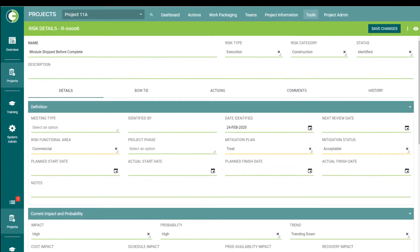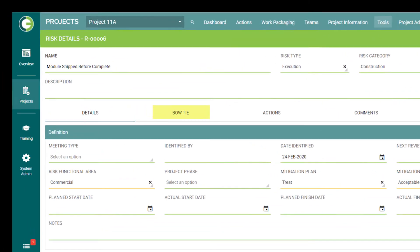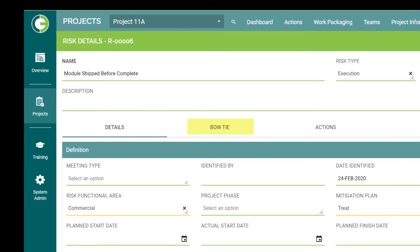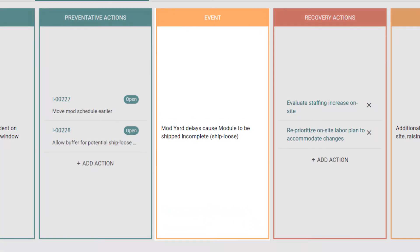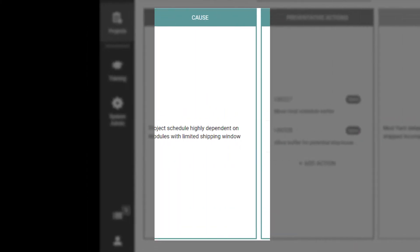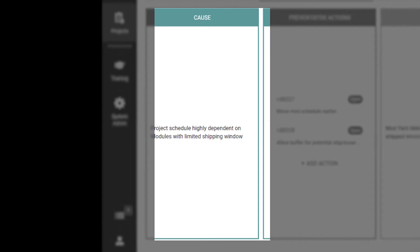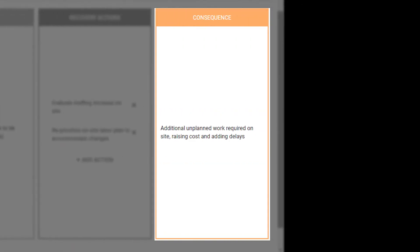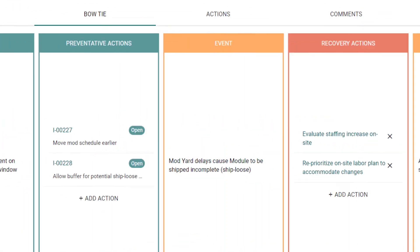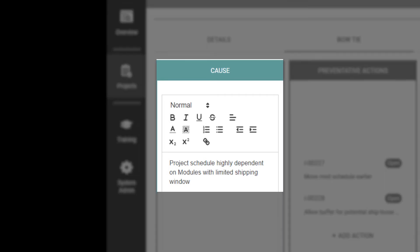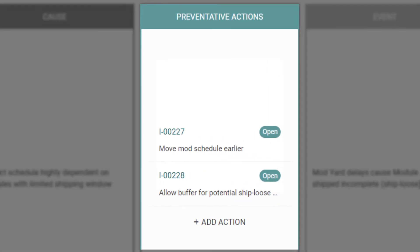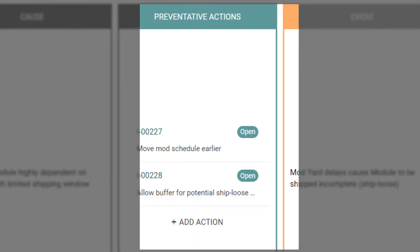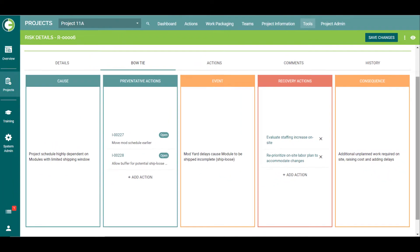That's it for the Details tab. The next tab is the Bowtie tab. This is a visual screen showing the potential event in the center, the cause of the event to the left, and the consequence if said event occurs to the right. These fields are all free text. This section also shows us any preventative actions that can be taken in order to prevent the event from happening, as well as any recovery actions that can be taken if the event occurs.